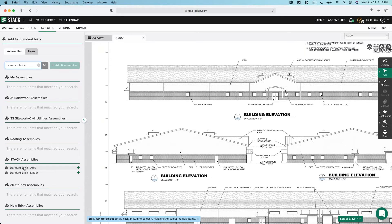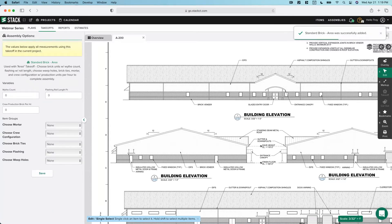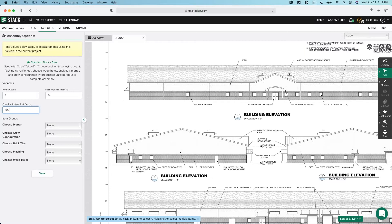We are going to select our standard brick area. You can either drill down and select it right there, or you can go up and search — I know what I want, I'm looking for standard brick, hit enter, and it'll search and find it right there. Nice and quick and easy. The key here is that you want to choose the assembly that matches your measurement type. We created an area type takeoff, so we want to attach an area type assembly — we can see an area and a linear option, and we want to go with the area.